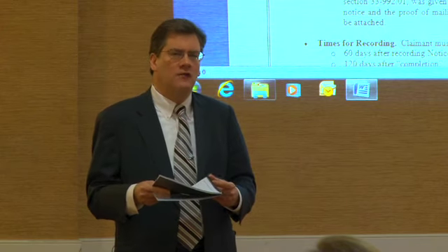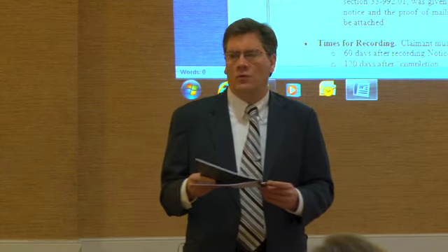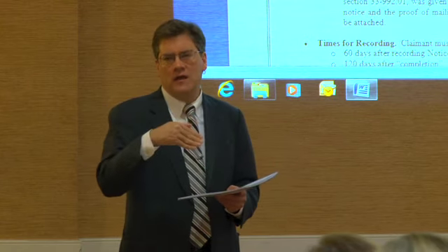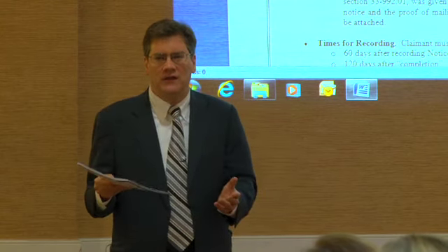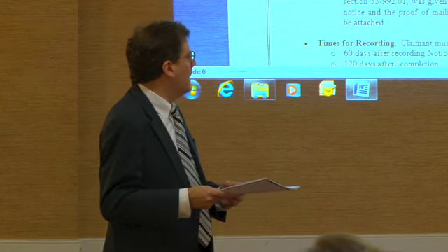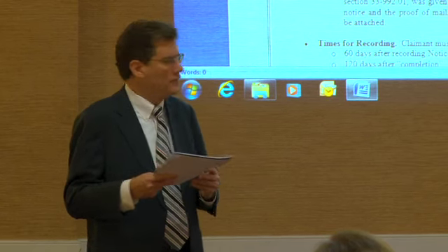And at this stage of the game, unless you're very good at looking up this information, and as I say, generally through the assessor's office is where we look up that information, because it's got links that take you right into the county recorder's website. You can get the deed. Exhibit A to the deed will be the legal description. Unless you want to put yourself to that task, it's better to pay somebody else to do it.